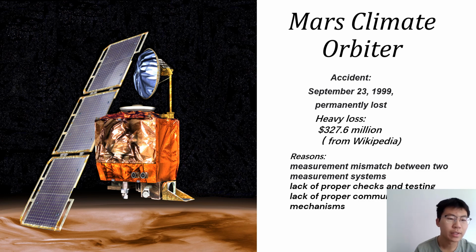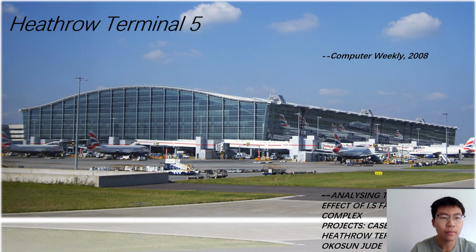In accordance with the SIS, the discrepancy between calculated and measured position, resulting in the discrepancy between desired and actual orbit insertion altitude, had been noticed earlier by at least two navigators, whose concerns were dismissed because they did not follow the rules about filling forms to document their concerns.